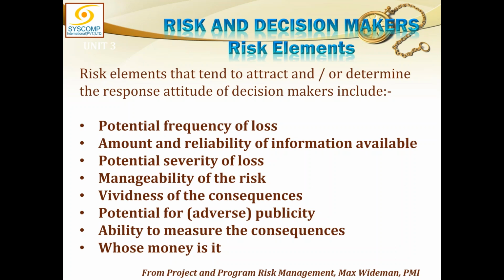Or potential severity of the loss, how much severe the loss is. If the loss is bearable and it's all right if I get late, normally it takes about 30 minutes for me to reach office, and in worst case I can reach in 1 hour, and I can always keep a margin of 1 hour. So there is no potential severity of the risk. I'm not losing millions of dollars here. So I can give myself a little bit more pain and start moving earlier, half an hour earlier, and I can still reach the office in time. So this is potential severity of the loss.